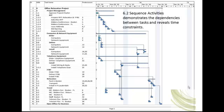The next process, 6.2 Sequence Activities, is executed by identifying the task dependencies. What tasks must be performed before this task can be performed? MS Project refers to dependencies as predecessors. The project manager begins the RFP process after the project charter is approved, as indicated by the two in the predecessor column. Tasks can have more than one dependency as illustrated with the task issue addenda. The project manager cannot issue addenda until the tasks bidders conference Boston and bidders conference Florida have been completed.